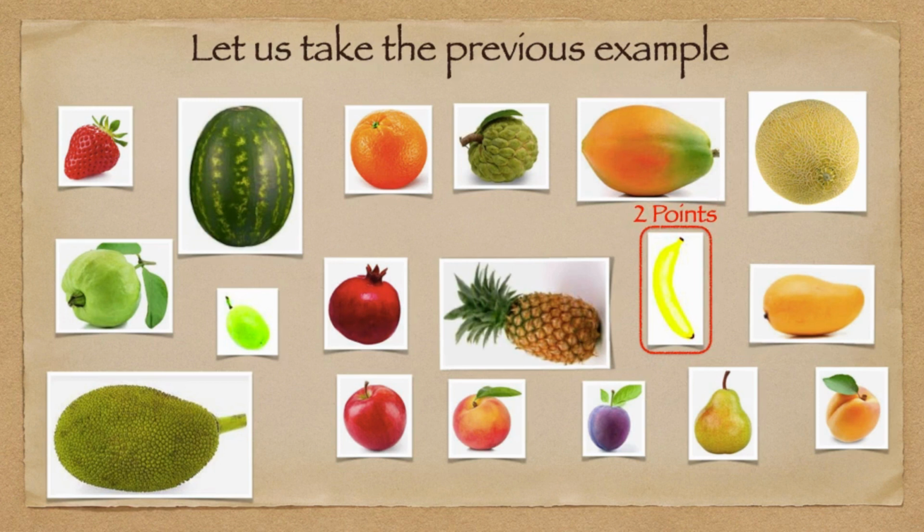The first reference we have identified can be 1, 2, 3, doesn't matter, a small number. Now comparing to the banana, they need to identify a little bigger one in terms of complexity, uncertainty and volume of work involved. So they have to look at the items in the backlog, and let's say they have selected apple. Now they compare the apple's complexity, uncertainty and volume of work with our first reference banana. Obviously they find that apple is complex compared to banana because chewing an apple is definitely harder than chewing the banana piece. And there may be some uncertainty.